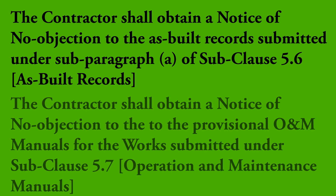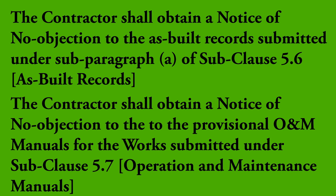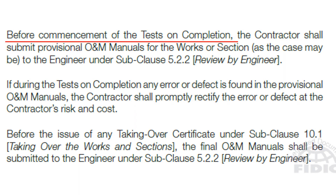Next, if the engineer has given or is deemed to have given a notice of no objection to the provisional O&M manuals for the works submitted under sub-clause 5.7, Operation and Maintenance Manuals, the contractor must obtain no objection for the provisional O&M manuals. Sub-clause 5.7 states that before commencement of tests on completion, the contractor shall submit provisional O&M manuals for the works or section — a similar procedure to the as-built records submission.